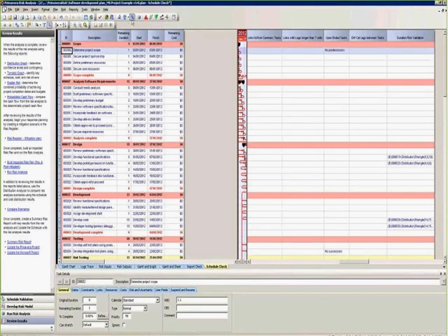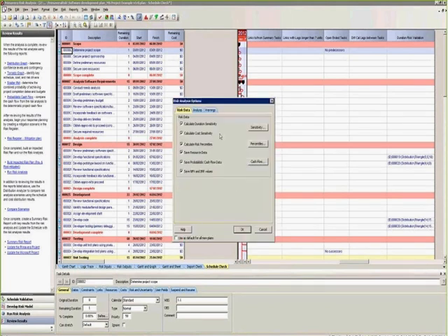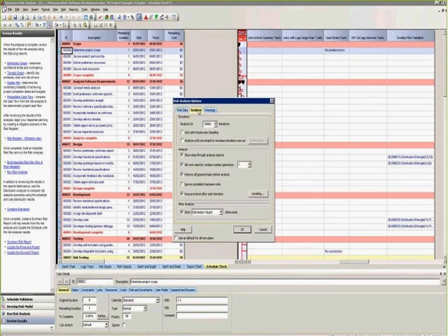To run this, all you have to do is press this little dice thing. And here we can run 10,000 trials, and there are some options. It'll calculate cost sensitivity, duration, save the NPV, how many trials, and then you even have Latin hypercube. So if you have a really big project, you can use this to save time. For our intents and purposes, we'll be doing Monte Carlo.